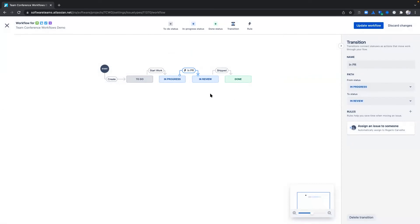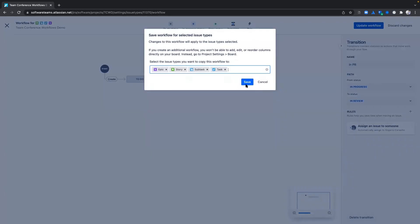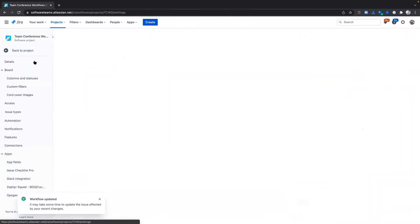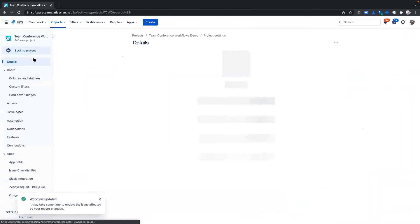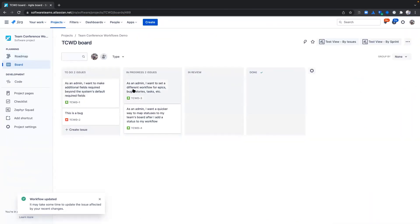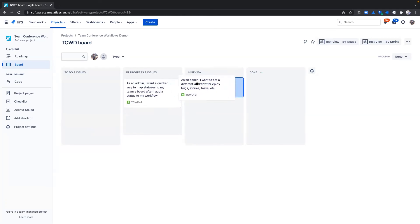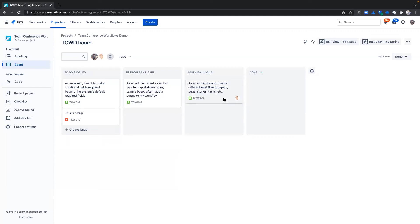Let's navigate back to the board to see how our new workflows are represented. To give all users on the project context of the workflow via the board, when an issue is ready to be transitioned to a new status, we've introduced drop zones. Drop zones are a visual cue of what transitions are available for an issue. In this case, I've completed work on my user story; it's ready to be transitioned to In Review. As you can see, the rule is automatically applied as Rogerio is assigned to the issue.